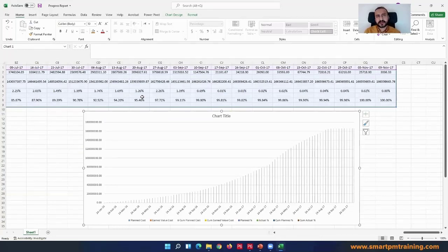But this is something that does not comply with my payment applications. Everyone is sensitive about cost, and people get confused because right now we are evaluating the progress curve as per the work done. In real life, the payment application will be different because you take into consideration some material on site cost, and also some deductions because of quality. You take into consideration variation orders. There are a lot of things going on here, retention for your advance payment or whatever. But this is for work done, so I will show the percentages.